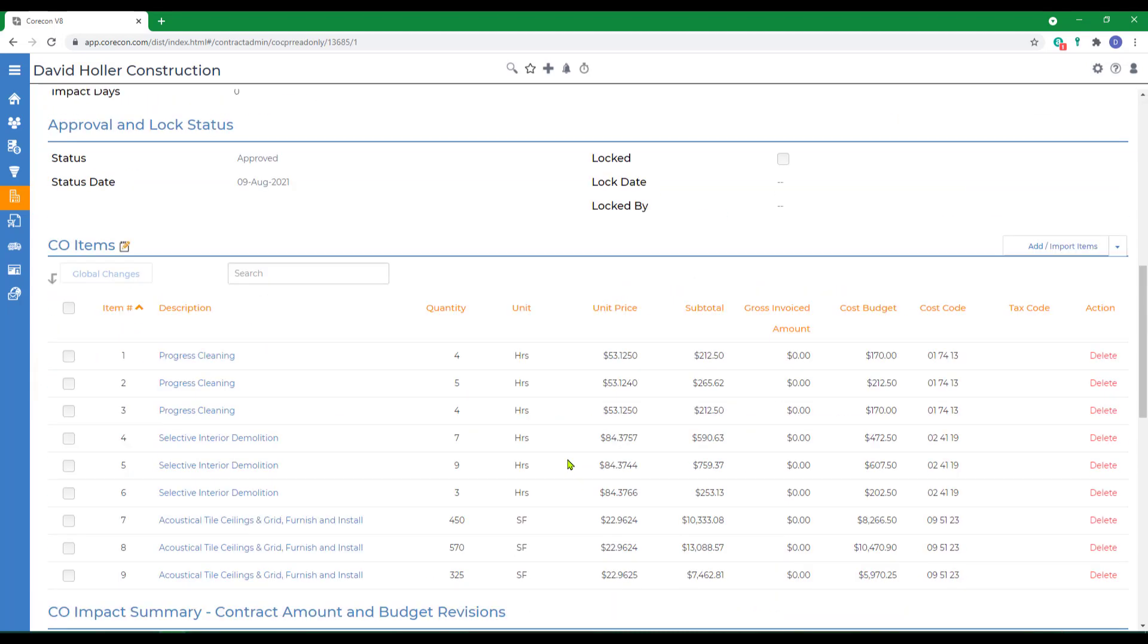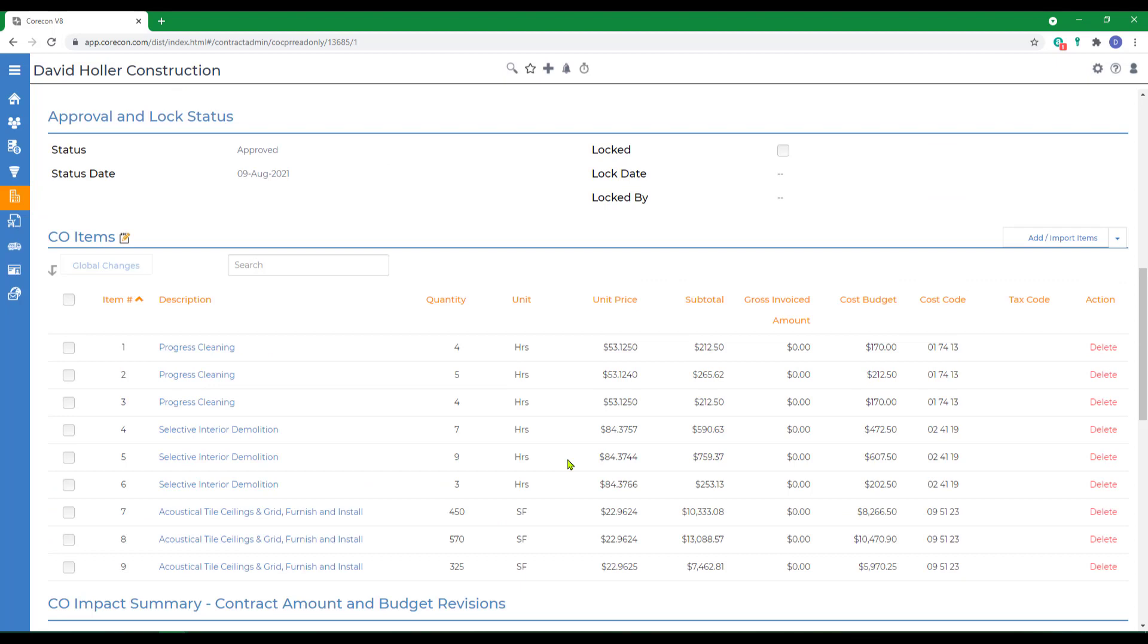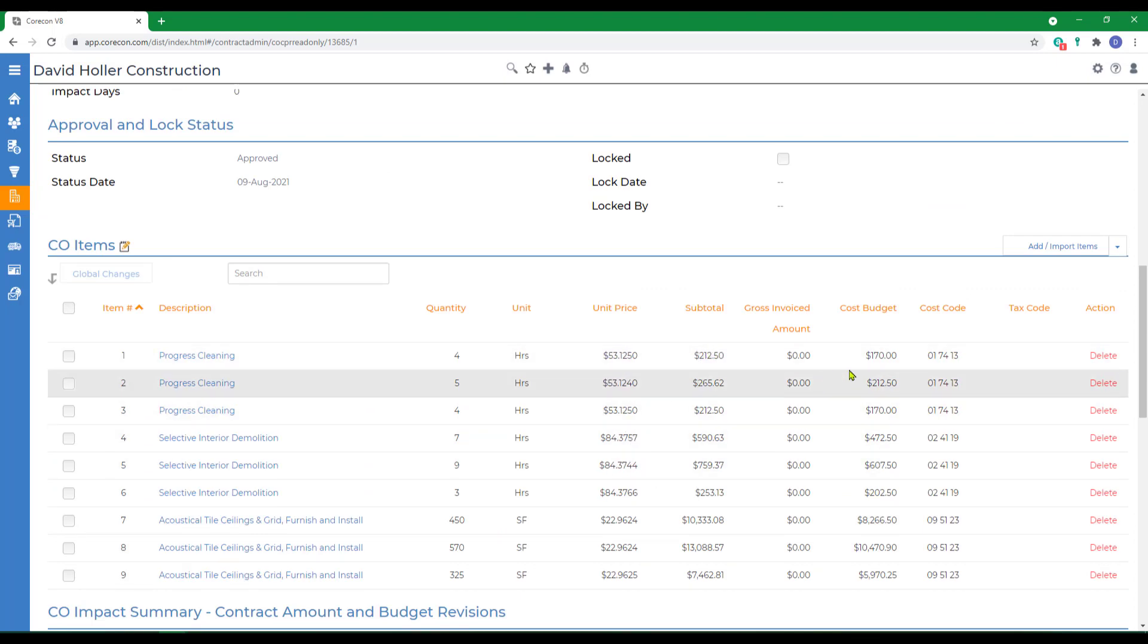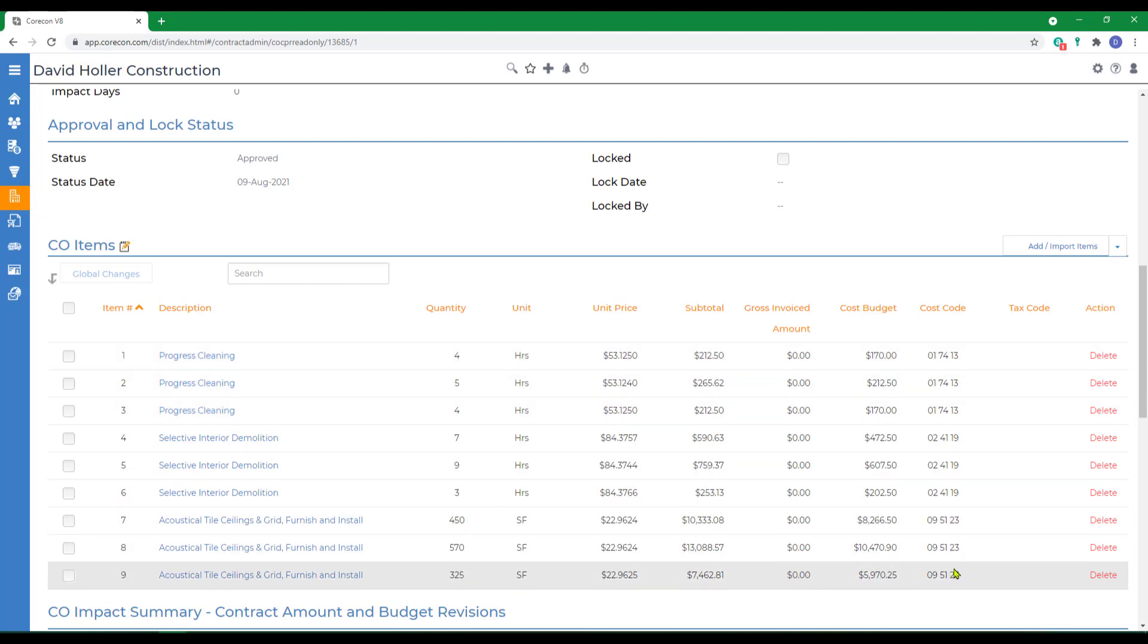We'll scroll down. Notice that the items have all come in both with a sell total, or sell price, and a cost budget. Each has been assigned to a job cost code.